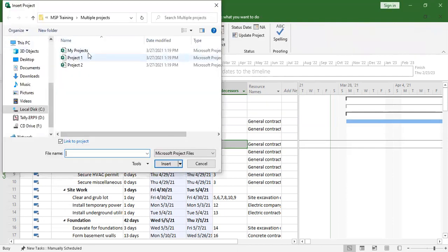But when we are importing, there's something I forgot to show you. When you're importing and select this, there is this option. When you check that it links to project, it will link them together. So that's where the modifications are possible. It becomes automatic as you save. As you change the other one, the other ones also get saved, as long as you command it to link.